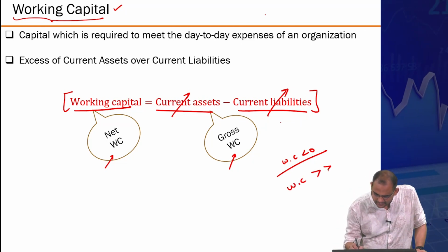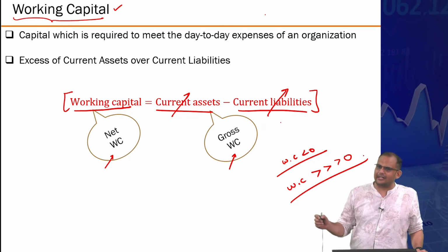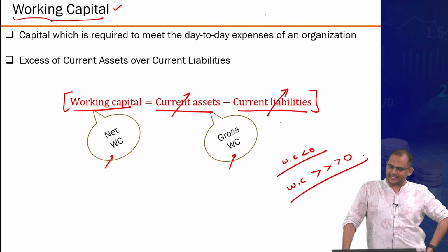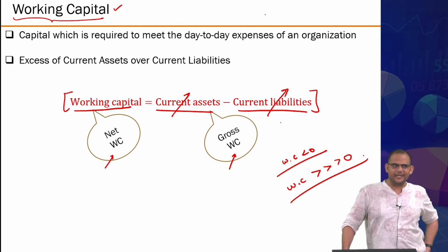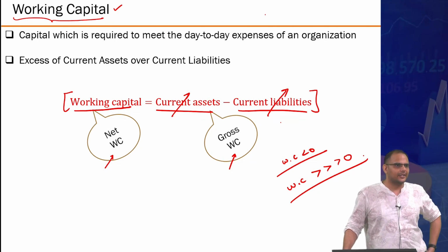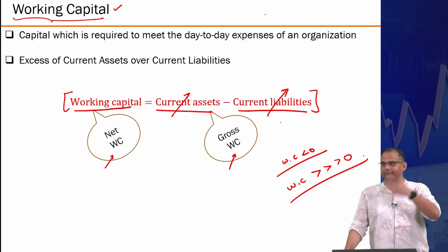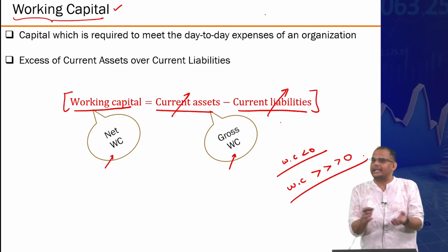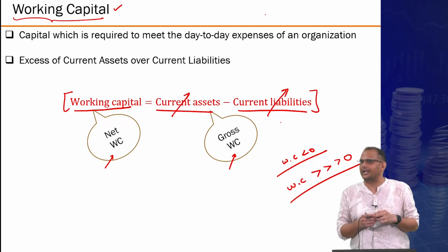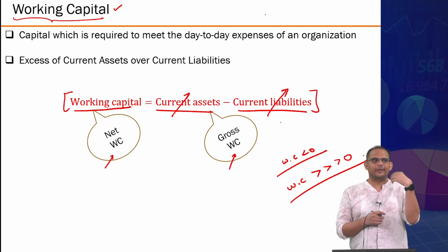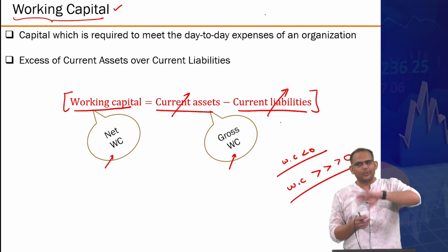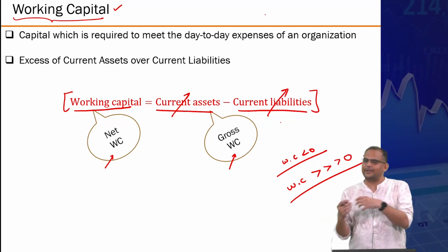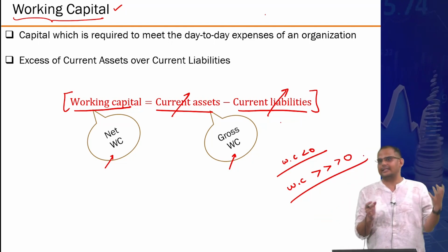Working capital much greater than 0. Is it a good thing? So if you have too much cash floating in your business, it means you are not running it efficiently. Your cash is not generating the revenues it should be generating as fast as you would ideally want, or basically your operations are not at an optimal stage. You have too many debtors, you are paying your creditors too fast, but you are not negotiating on the client side and things like that.